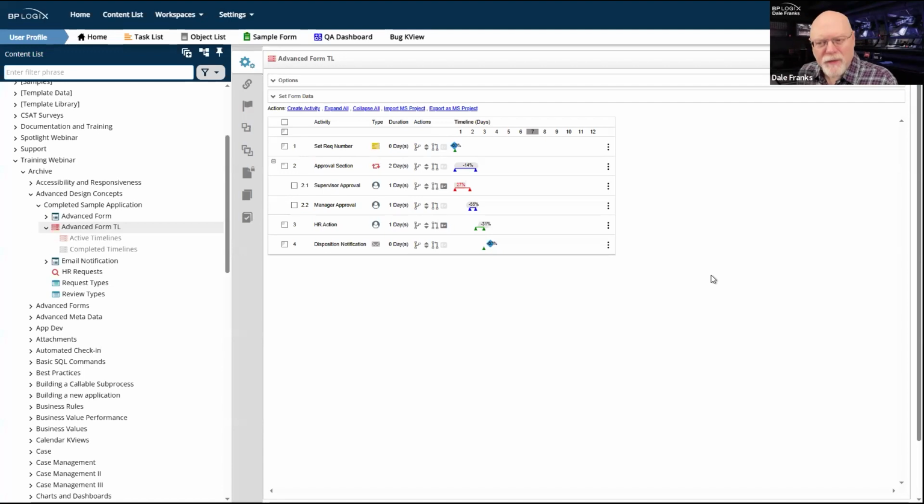And it is fairly close because if I look at my tasks, the very first one, the approval section, that is a parent activity. It's also a looping activity. And it's going a little faster than the 2 days that were allotted to it by about 14%. So it's predicted to end in about 1.7 days when it's configured to end in 2 days.